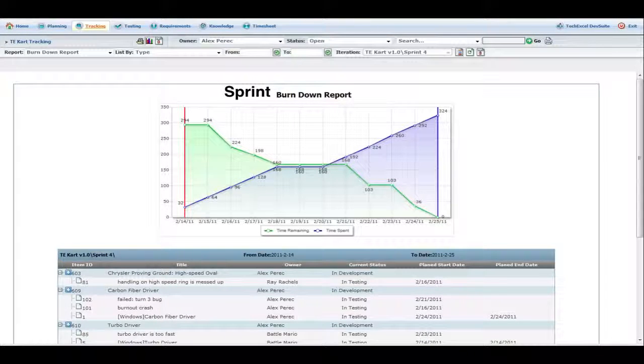With a sprint burndown, we start with our total task estimates, and as work is completed, we lower those estimates till they hit 0. This gives us our burndown line. Within a few days of the sprint starting, we can check the slope of our burndown line to gauge our velocity and estimate when all the tasks will be completed.